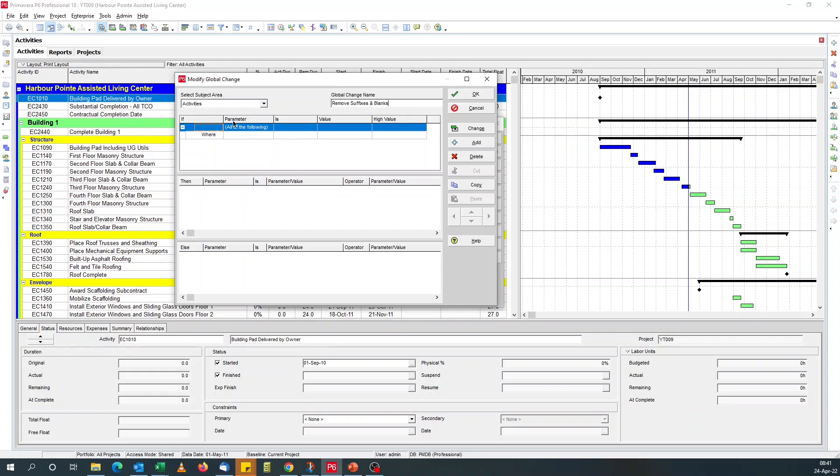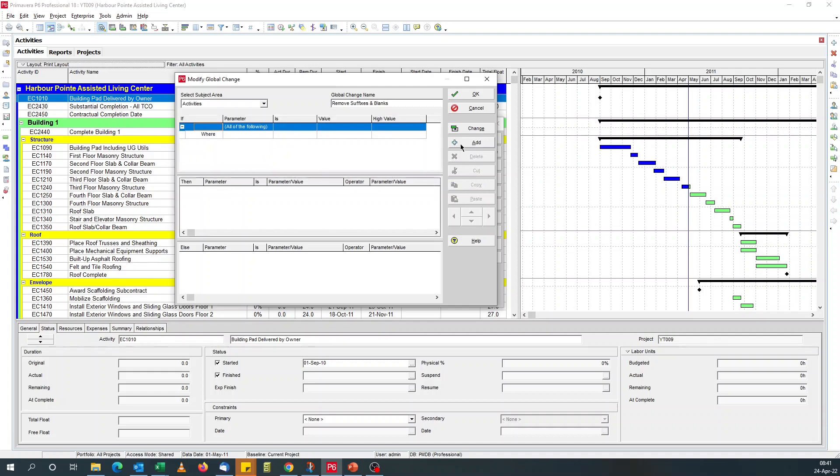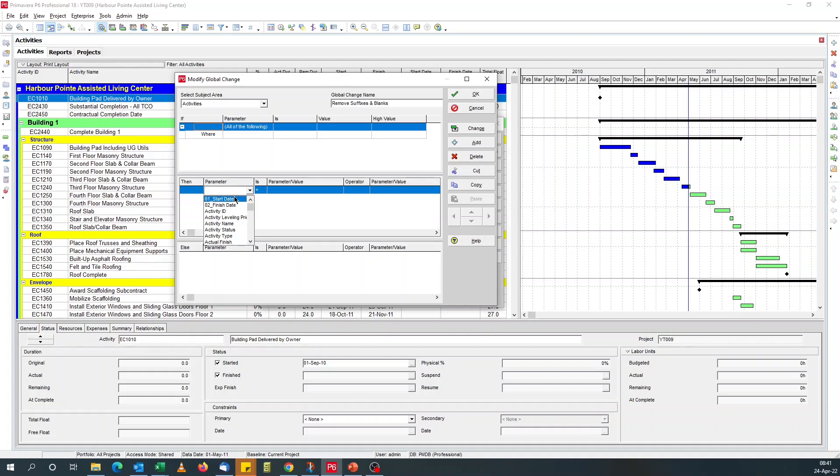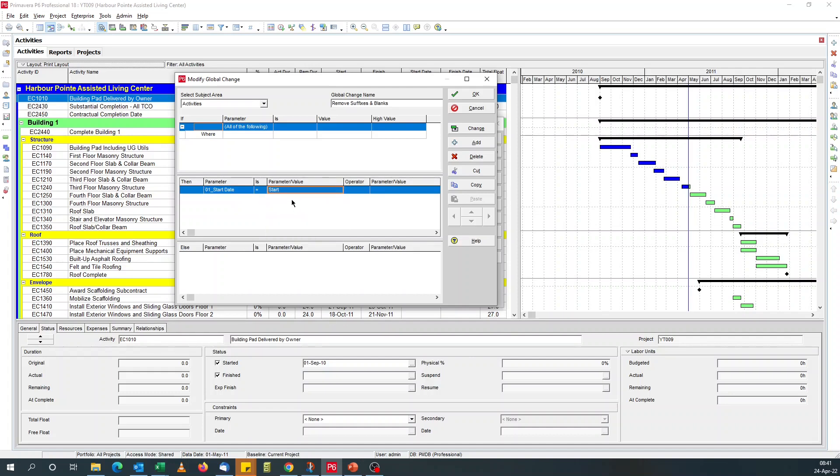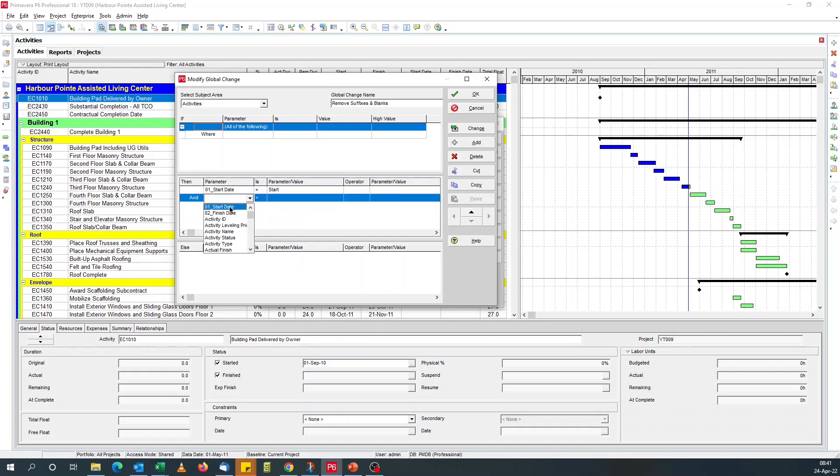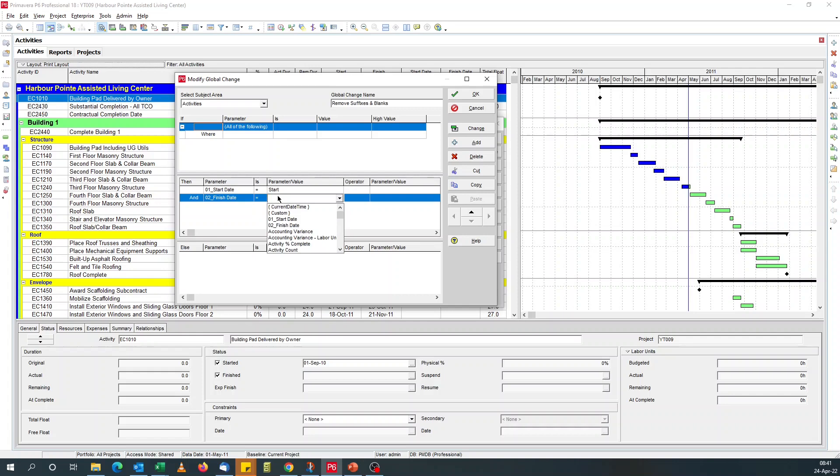For the if section, nothing, we don't need to do anything there. We come to the then, then you add. So you look for our UDF. Because we use numbers, they appear at the top of your parameters. So for the parameter, we choose start date equal to start date. So we're giving it the P6 start date. And finish date equal to the P6 finish date.